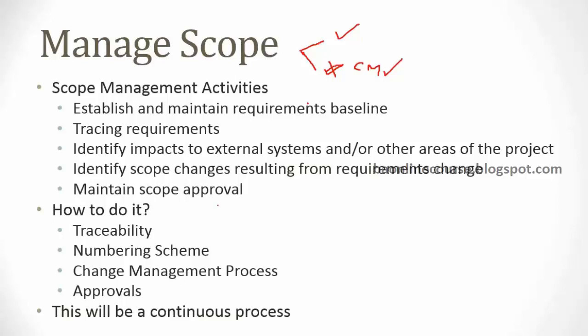So how do we do this? There are some ways in which you could actually engage them. First step that you need to do is to baseline your documents, right? Now, how do you know that you have committed this? So you have committed this for these 10 features, right? Ideally, you would look at maybe your SOW or your business case document. Make sure that okay, we committed for these 10 features. So let's capture the details into the requirements document and ensure that it gets delivered, right?